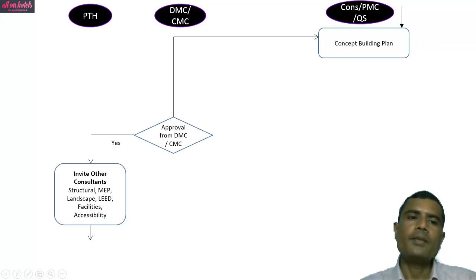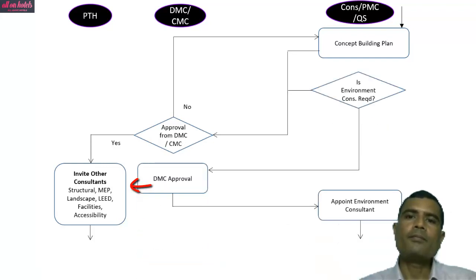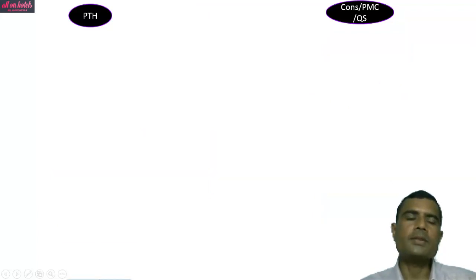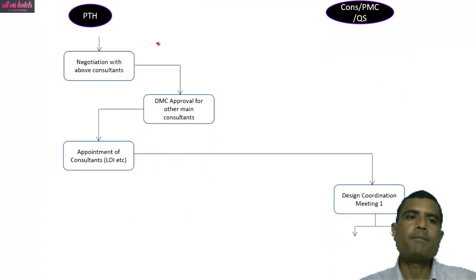If yes, then project team at hotel invites other consultants for appointment: structural, MEP, that is mechanical, electrical, plumbing, landscape, LEED platinum, facilities consultant, accessibility consultant, etc. In addition to this, the environment consultant requirement is also sought. If it is required, then DMC approval is taken. Then appointment of environment consultant is done in case of large projects.